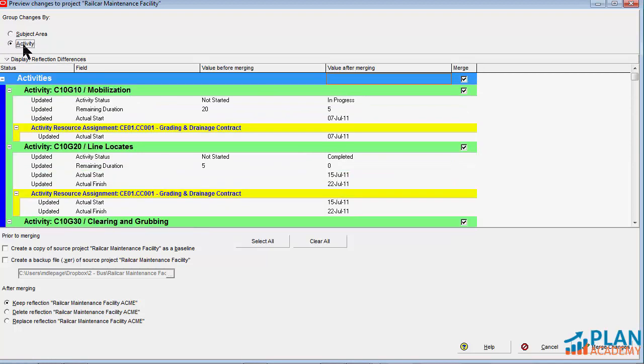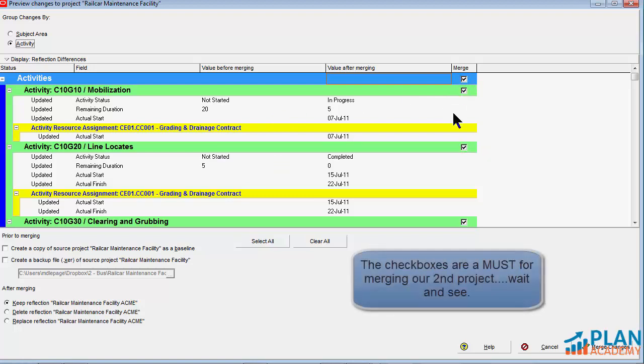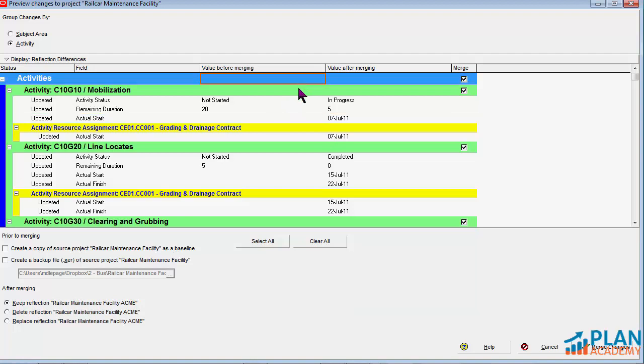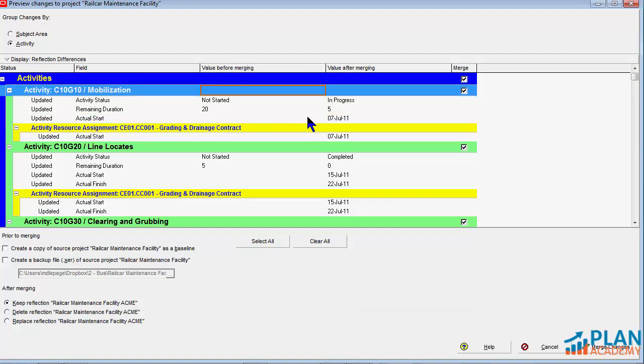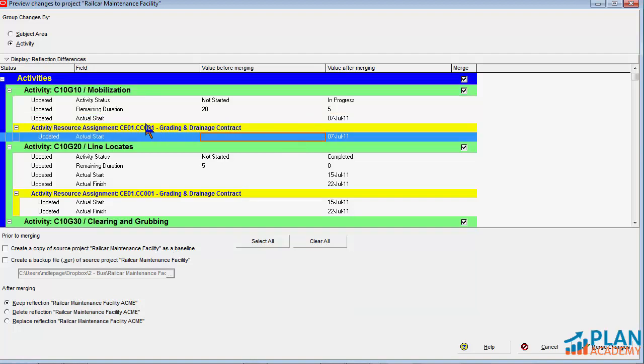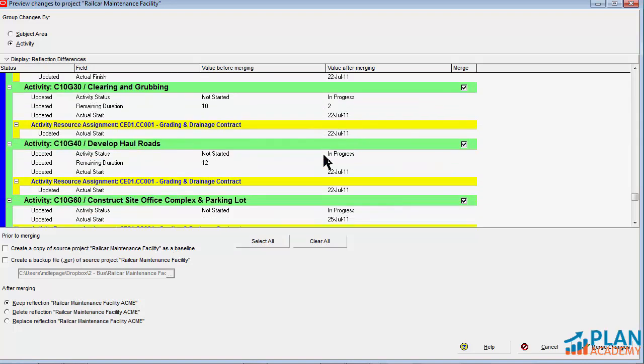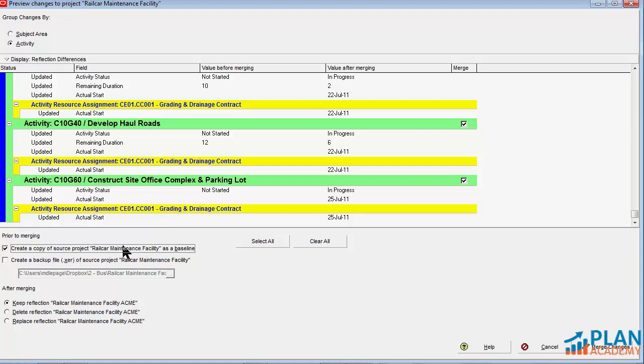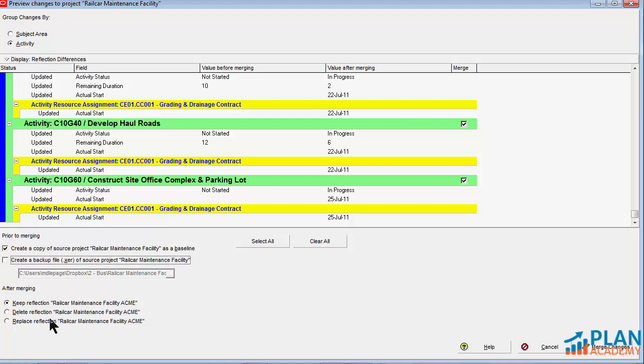I tend to like to work in this activity view. And what that gives me is gives me the ability to choose which updates will be merged in with these check boxes. So once again, we have the ability to kind of review, mobilization. This is what's changed. And you can see that now we've got an actual start for this resource assignment as well. As I merge these changes in, if I ever need to go back to the project, how the project is at this moment, I'll save a copy of that as a baseline and store it. So if I ever need to revert back, I can always restore that baseline as a project and I'm back where I started. I can also create a backup file if I want to save it to my hard drive. So I can have a baseline and an XCR file.